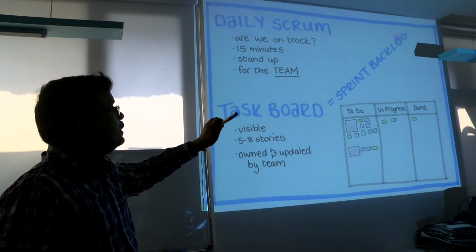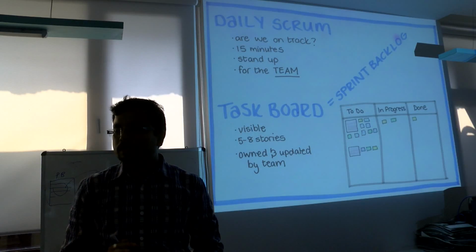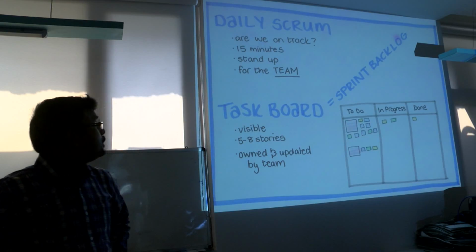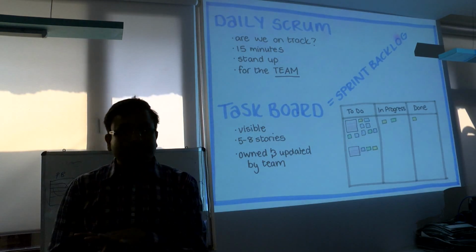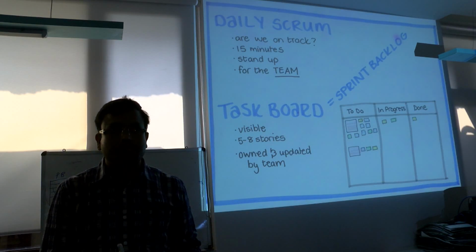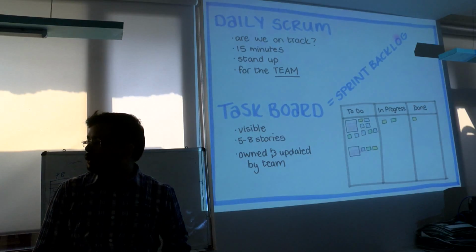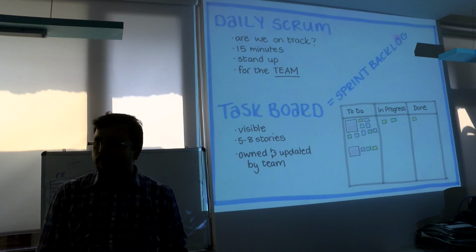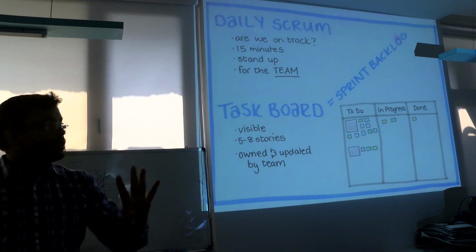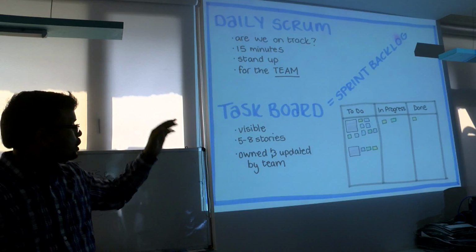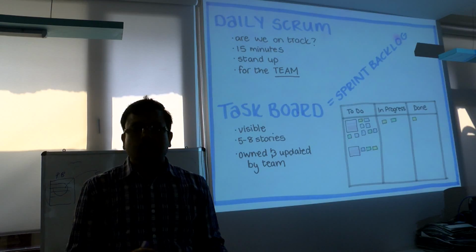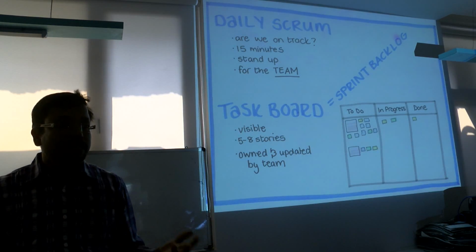So on a daily basis, throughout the whole sprint, we do the Scrum stand-up meeting. What is the stand-up meeting and what is the criteria? One criteria is that it's a time box, meaning 15 minutes, and it won't be more than 15 minutes. Only 15 minutes. I don't know how much time you take for the stand-up meeting in G4S. Now, what is the purpose of that meeting? Only 3 questions you have to ask. This is not written, what I am telling you. Only 3 questions: what you did yesterday, what you will do today, and are there any impediments.